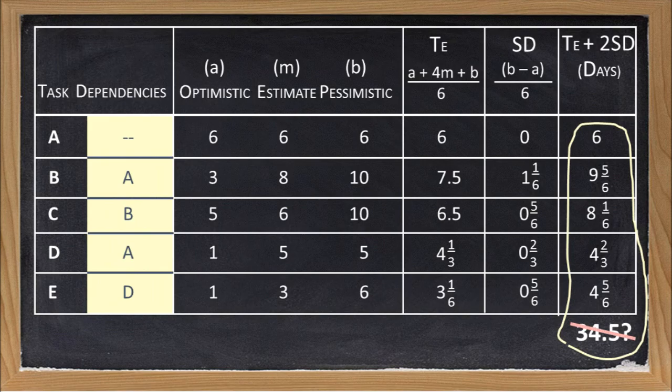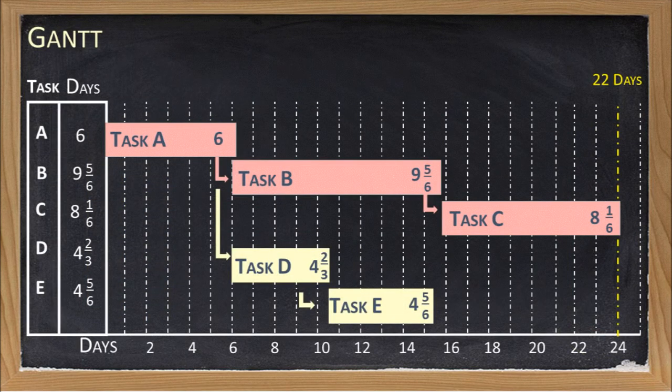The duration of tasks that are not on the critical path does count towards the project's overall level of effort, but not towards the project's overall duration. If we once again look at our Gantt chart, we see that only 3 of the tasks are actually on the critical path, and thus contribute to the project's overall duration. Therefore, in determining the overall duration for the schedule, we only need to consider the duration of these 3 tasks.